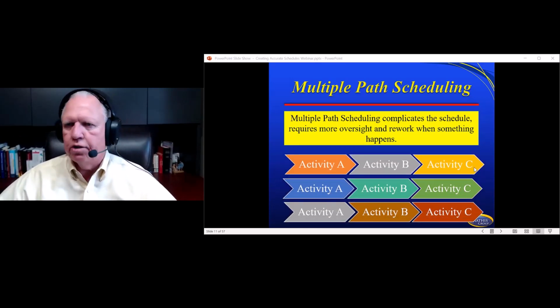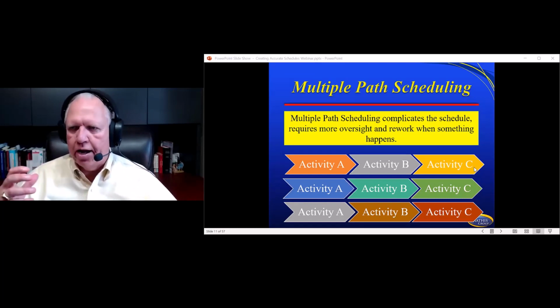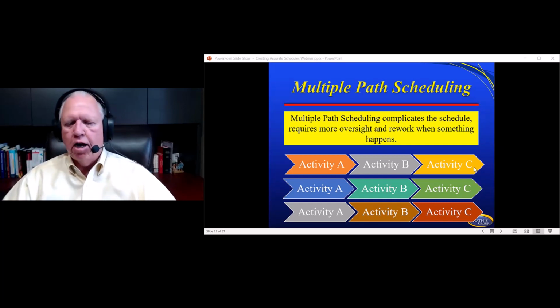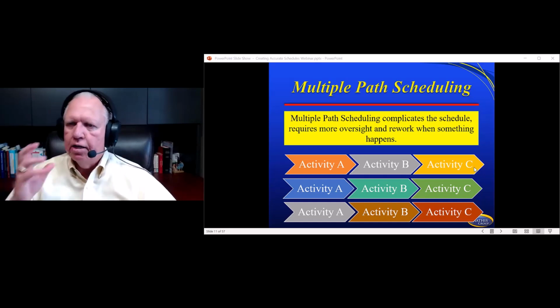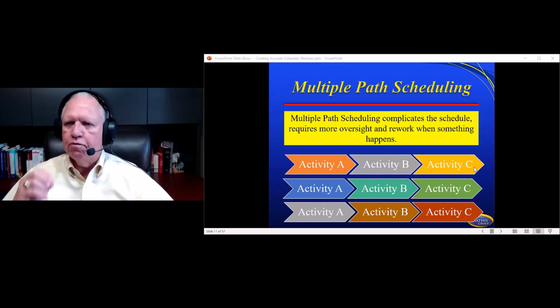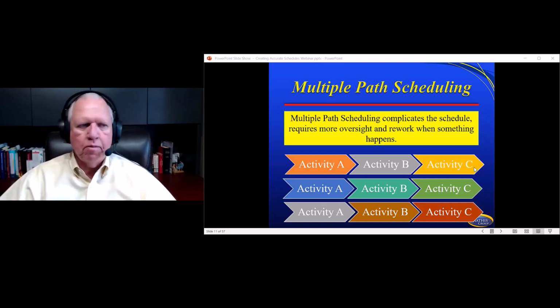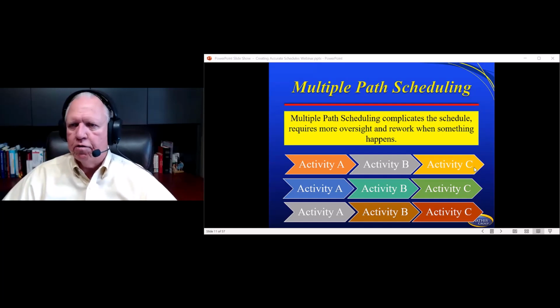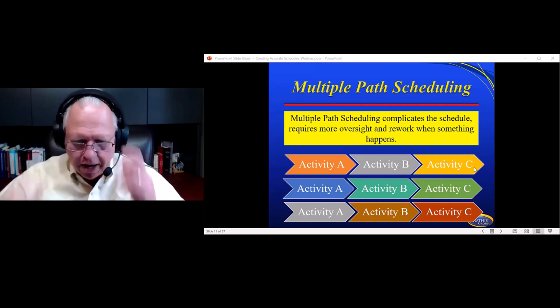And that's even on one project because we were trying to fast track that project, and rightly so. I get why we're doing that in so many cases. But the point is that sometimes people think, well, we're going to fast track everything. Limited resources and fast tracking everything is a prescription for disaster on some project at some point. Somebody's going to miss something that's going to give you a hiccup. Or here's the other side that maybe you haven't thought of: burnout. You're going to burn your people out. And those people are going to end up going someplace else and working for somebody else, and they'll be a great employee someplace else. So we've got to be able to balance those pieces out.